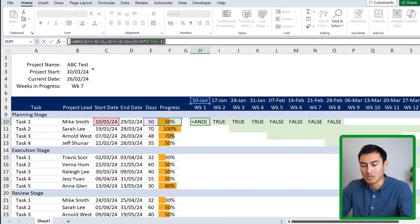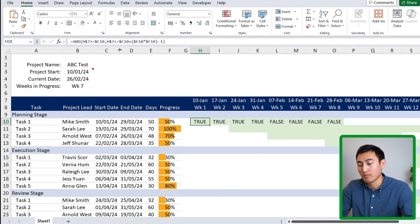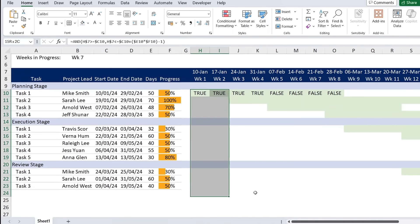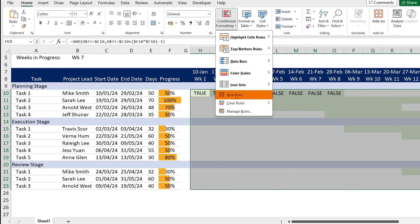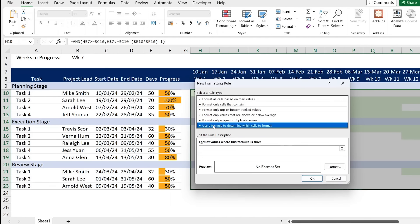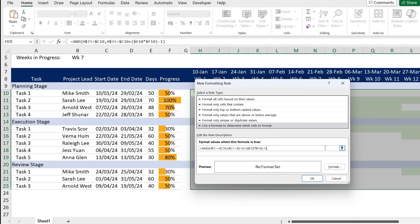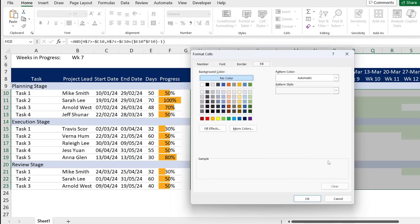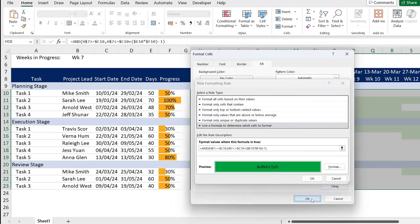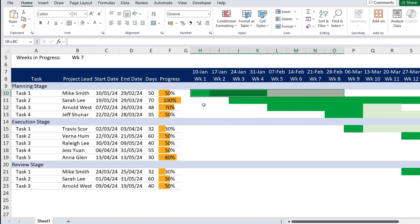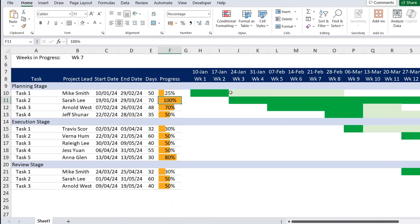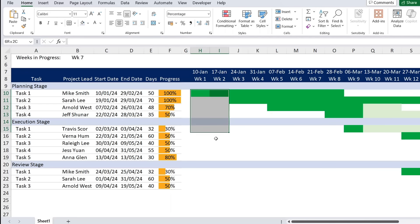With the formula confirmed, copy it, select the entire Gantt area, go to Conditional Formatting, New Rule, use a formula, and paste it in. Set the format fill to dark green, click OK. Delete the helper TRUE/FALSE cells. Now at 25% the dark green bar is a quarter of the way, at 50% it's halfway, and at 100% it's full — updating dynamically.